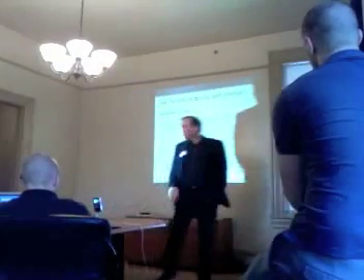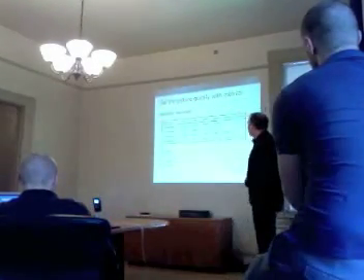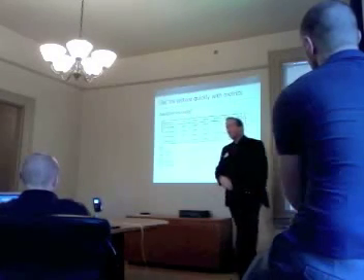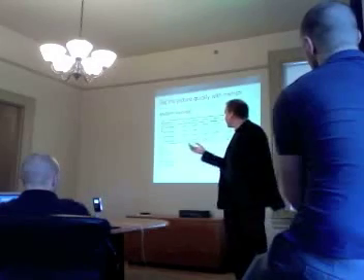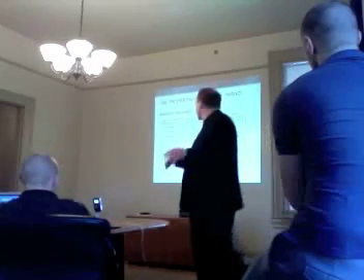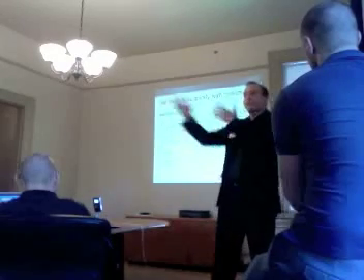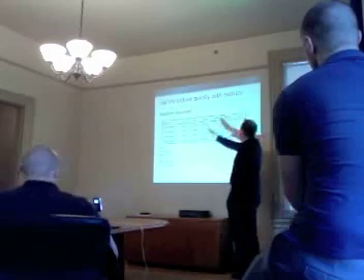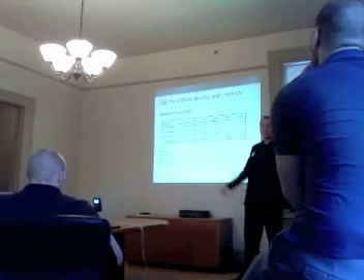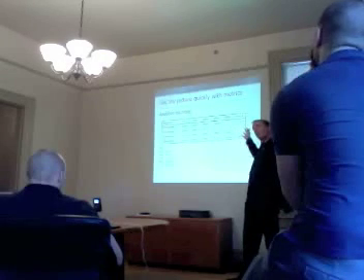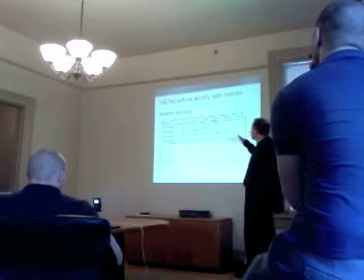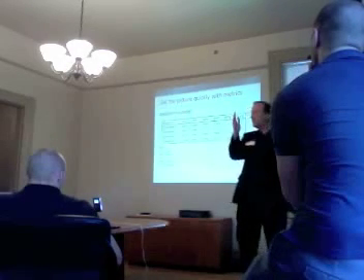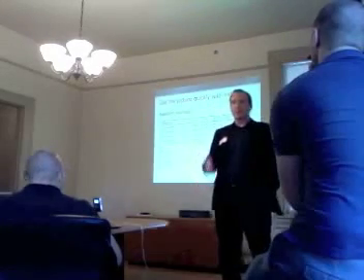Another example is I can have percentages. If there's steps that I'm going through, say I'm building a website, and I have to design the website, and then I build a static mock-up of it, and then link it, and ultimately it's done. If I have 4 of them, I can easily say, this is where each one of them is. This gives me a good idea of where everything is. It also potentially tells me where the bottleneck is. I might see things marching along really easy, and then it hits 60%, and everything stops. Well, what's going on there?